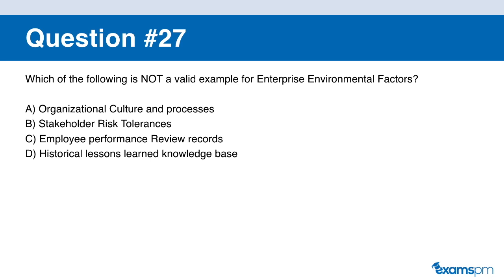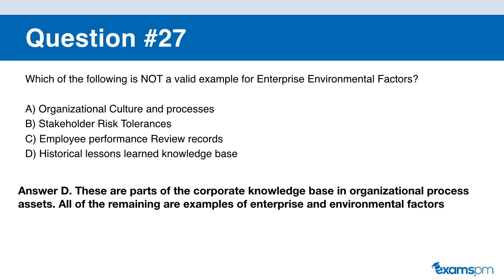Question number twenty-seven. Which of the following is NOT a valid example of enterprise environmental factors? A: organizational culture and processes. B: stakeholder risk tolerance. C: employee performance review records. D: historical lessons learned knowledge base. If you said D, you are correct. All of the above are enterprise environmental factors except for the historical lessons learned knowledge base, which is part of your organizational process assets (OPA), not enterprise environmental factors.